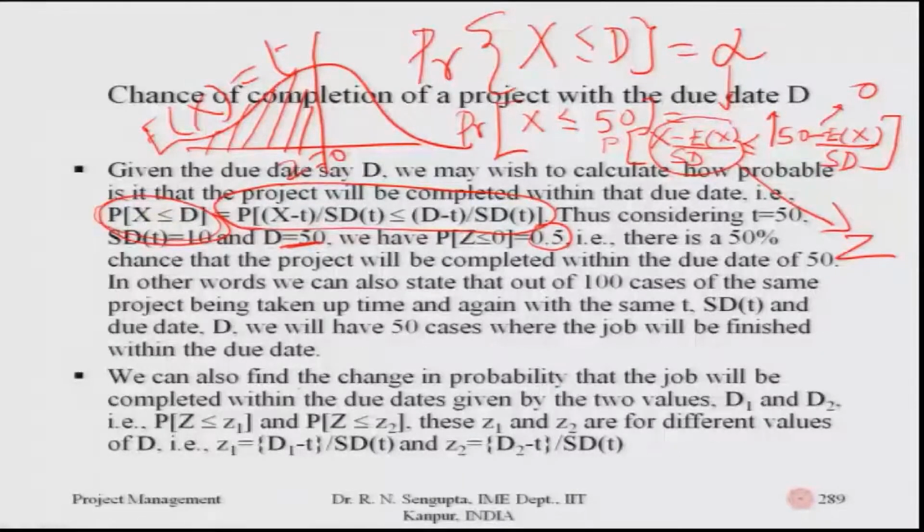Consider this: you are the vendor, coming back to the laying of the road from the city of Bhopal to Indore, and the overall average decided due date is 3 months. If it exceeds the 3 months, but is less than, say, 4 months, you pay a penalty of, consider, 2 lakhs per day. Now, after the 4th month your penalty increases to 5 lakhs per day.